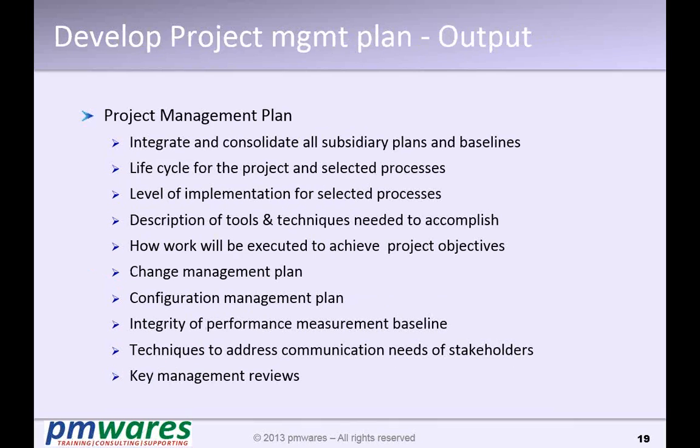So what is a project management plan? It's a consolidated, integrated plan which contains all the subsidiary plans. It defines the life cycle of the project. It describes all the tools and techniques which you're going to use on the project. So suppose for requirement analysis you want to use Delphi technique. You should mention in the project management plan that for requirement analysis we will use this tool.